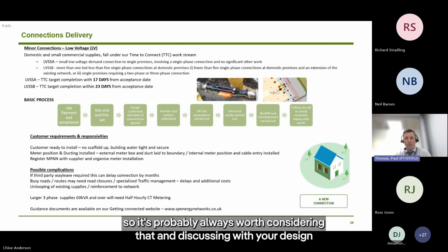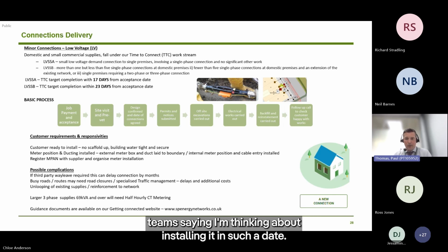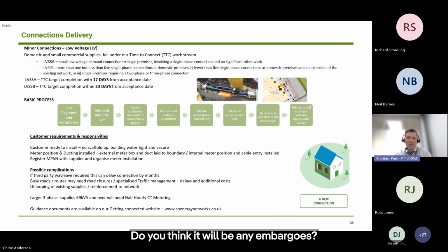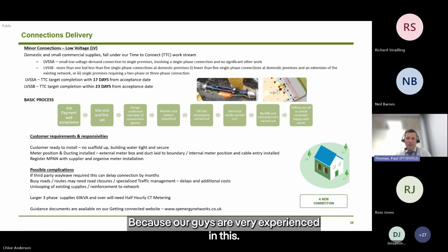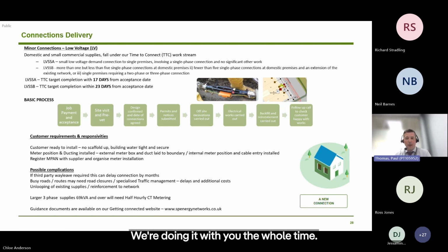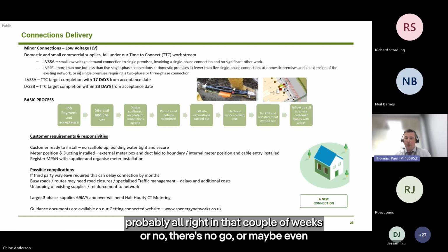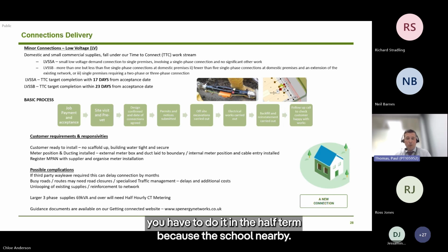So it's probably always worth considering that and discussing with your design team, saying, I'm thinking about installing it on such a date. Do you think there'll be any embargoes? Because our guys are very experienced in this. We're doing it all the time. We'll have a look through, speak to the council and go, actually, no, you're probably all right in that couple of weeks, or no, it's a no-go, or it may even be that you have to do it in a half term because there's a school nearby. So just all things that you need to consider, really.